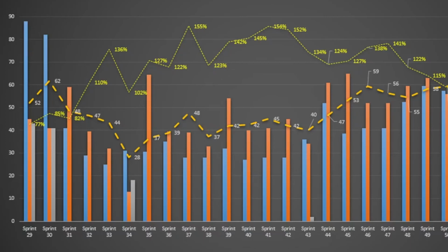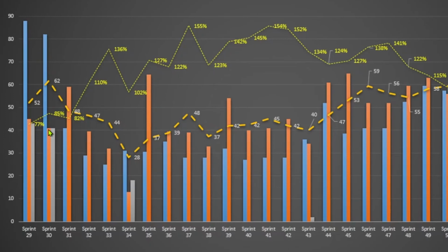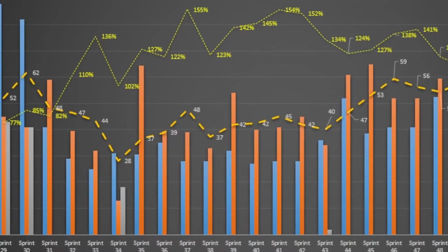And you can come back to the team and say, well, how did we do, team? Well, not so good. Not so good. We took on 88 and only completed about 45. Next sprint, they took on 82 and only completed about 40. So finally, they said, guys, we got to stop doing that.